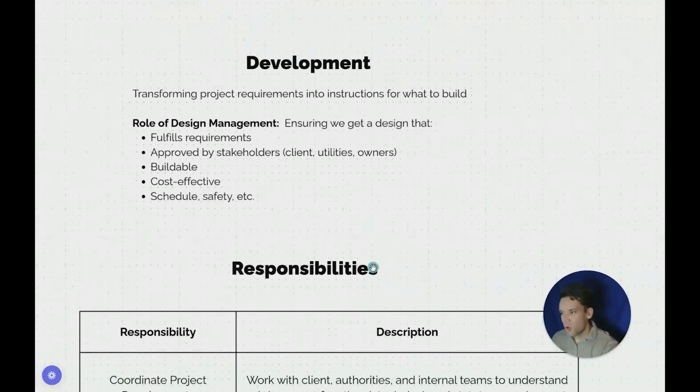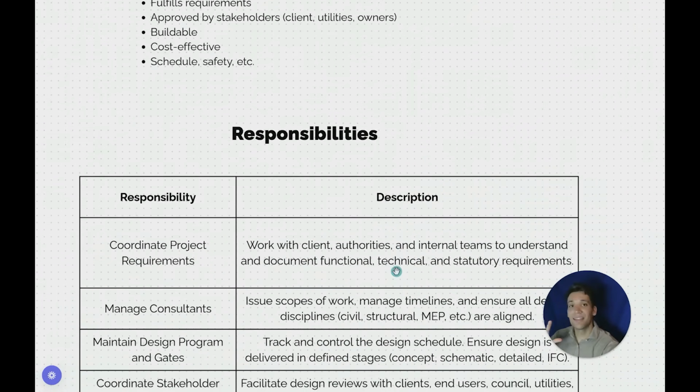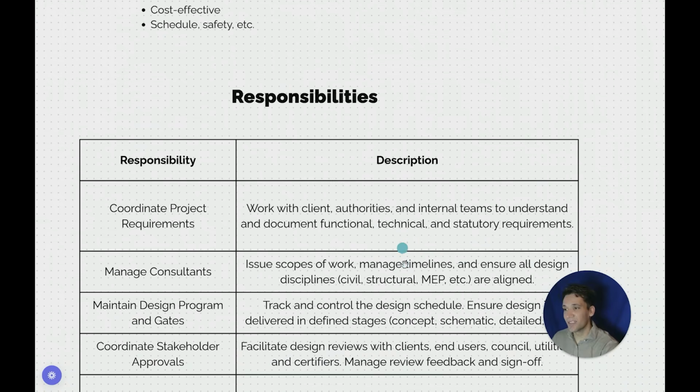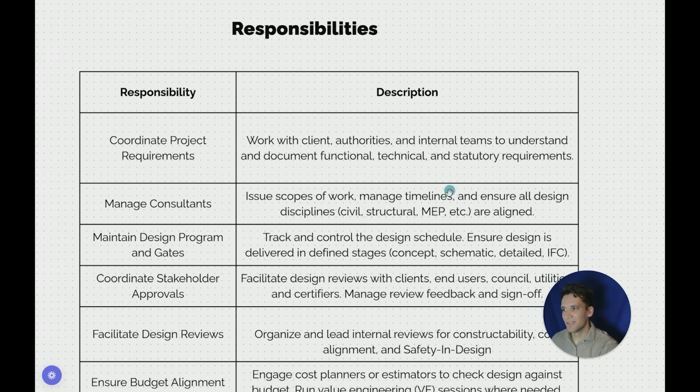Okay, so if we then talk about the core responsibilities in design management, what is the design manager actually doing within this process of design development? So what is the design manager doing in this process of taking the initial project requirements and turning them into an IFC design? Importantly, the design manager isn't the one actually doing the design. What are they doing? They're coordinating project requirements, so they're working with clients, authorities, and internal teams to understand and document the functional, technical, and statutory requirements.